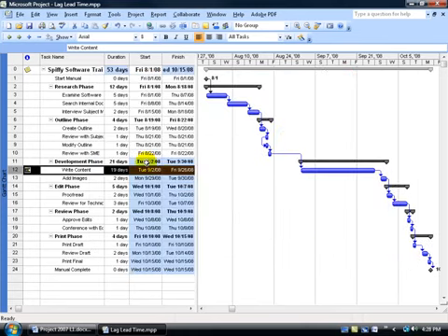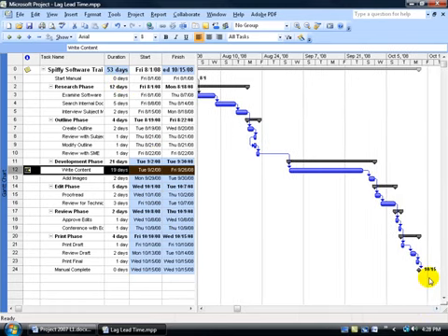And you can see that change is affecting all these tasks that have been shaded, their start and finish dates, including the overall project date. Now it's been pushed out. Scroll over, now it's going out to October the 15th. So you can see over here in the Gantt chart that because we have a start no earlier than, we've got all this lag or delay time.